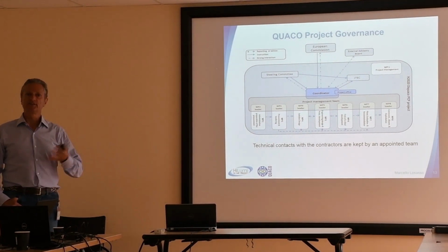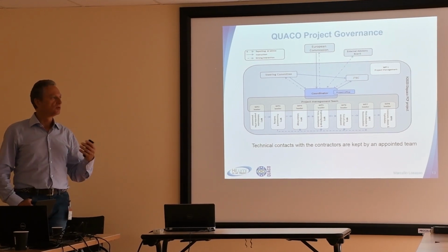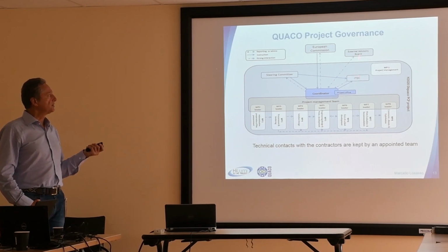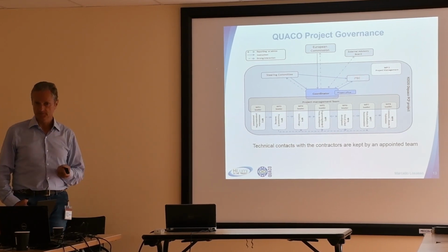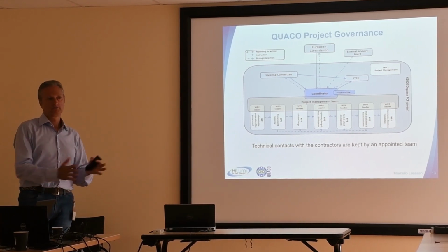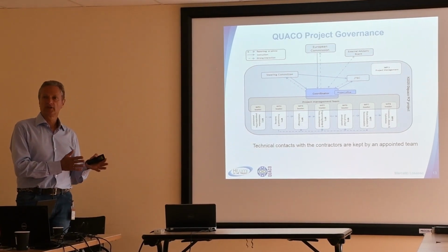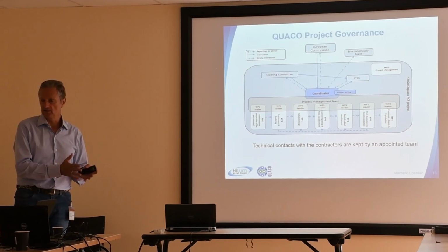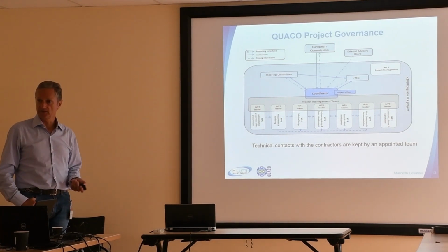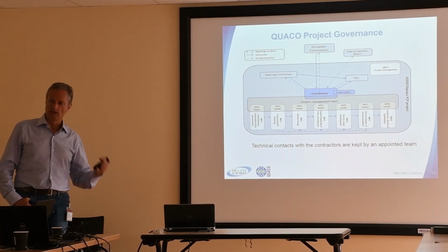As we have this number of tenders to prepare, to evaluate, to contract, to award, I thought at the beginning to have a specific committee composed of all members of the consortium, and that is not only technical, but also with legal and administrative support that can look at the documentation to produce and to evaluate.